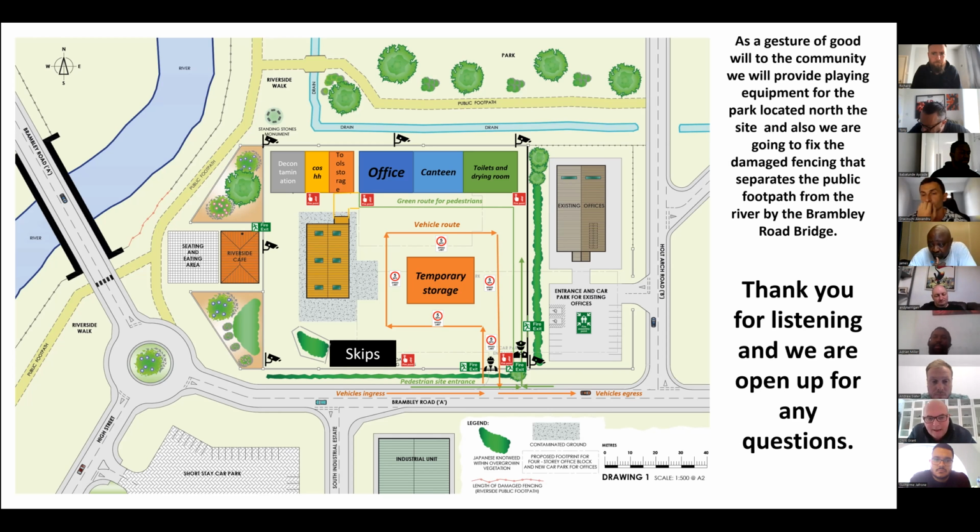Okay, and I take it that's where your muster point is. Have they agreed to that? Is the parking off site? I don't see anything about the parking there. Yeah. Basically, what we've agreed is the parking's off site up by the roundabout. There's a car park area. So we're not going to use the existing building's parking space. The lads are going to park off site. But we had an agreement with them where we can use a section of it for the muster point itself. We've put the signage up there, and they're aware that we can have 3 bays at any one time where we can form a muster point.